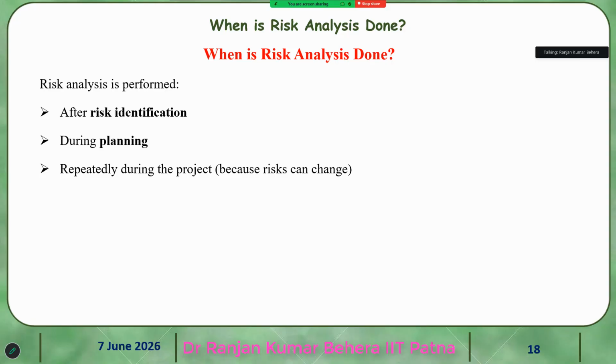Now, when is the risk analysis done? After risk identification, during planning, when we plan, at that time we should do this risk analysis, and repeatedly during the project, because risk can change during the project.